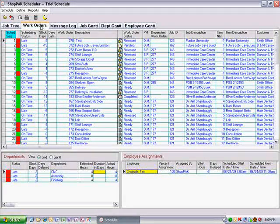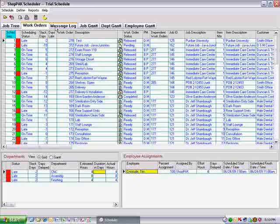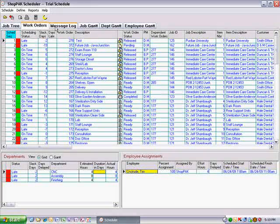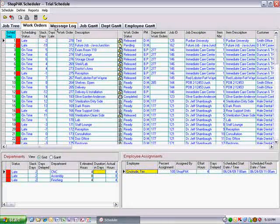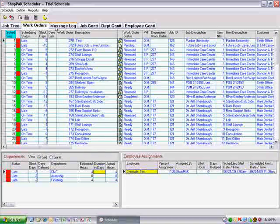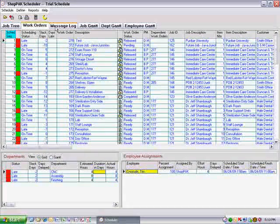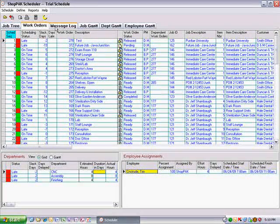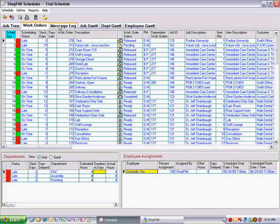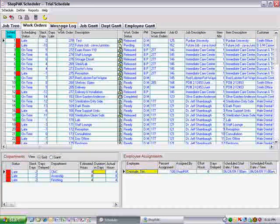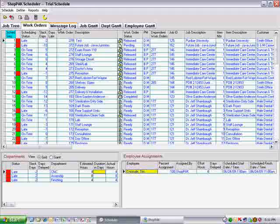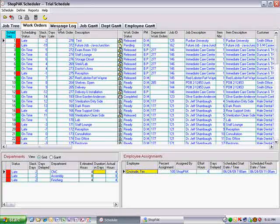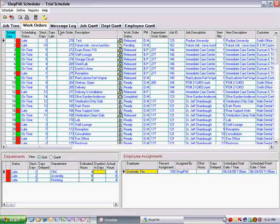A job like this isn't in ProjectPak yet, since you don't know if you're going to bid it or not. First, you need to assess its potential impact on committed jobs in the schedule by scheduling it. Since a future job isn't in ProjectPak yet, you can't convert it over to ShopPak from ProjectPak. You need to build it manually in ShopPak.